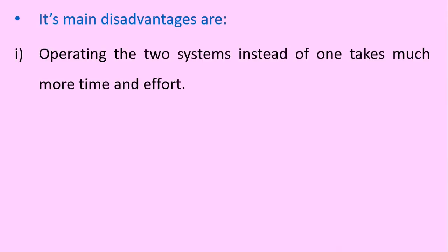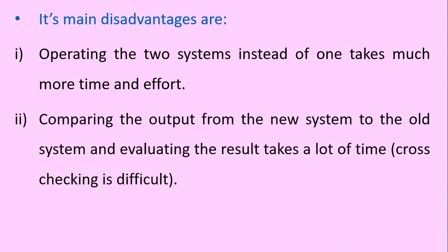However, it carries with it the following disadvantages. Number one, operating the two systems instead of one system takes a lot of time and effort. Number two, comparing the output from the new system to the old system and evaluating the results takes a lot of time because a lot of cross-checking is carried out and it is difficult.